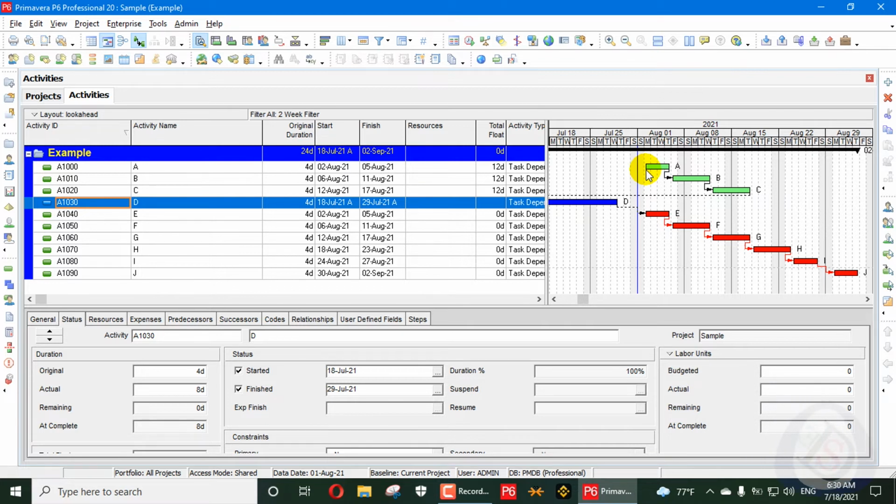If the out of sequence activity is done on time or before time, we can do that work with progress override because it does not depend on previous activities. When scheduling using progress override, Primavera P6 ignores the relationship between the activities and schedules any remaining duration of the out of sequence activity from the data date. It will not consider any other date; it will just schedule and go on.